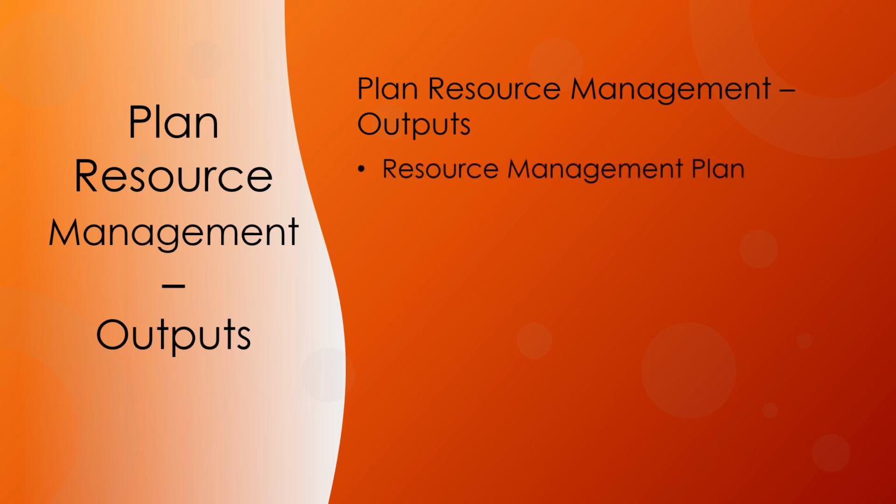The resource management plan is the component of the project management plan that provides guidance on how project resources should be categorized, allocated, managed, and released. It may be divided between the team management plan and physical resource management plan according to the specifics of the project. The resource management plan may include identification of resources. These are the methods for identifying and quantifying team and physical resources needed. Acquiring resources. These are the guidance on how to acquire team and physical resources for the project.